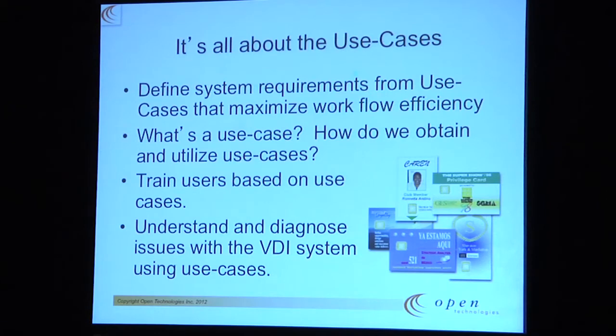But if at some point in time, six months later, you say it's broke, well, it's not really broke, you're now deciding to use it in a new way. Let's document that. That's a use case. Document the use case, and we'll say, hey, let's modify the system to allow for the use case. So it's all about the use cases. Train your users based on the use cases. You understand and diagnose your system based on the use cases.